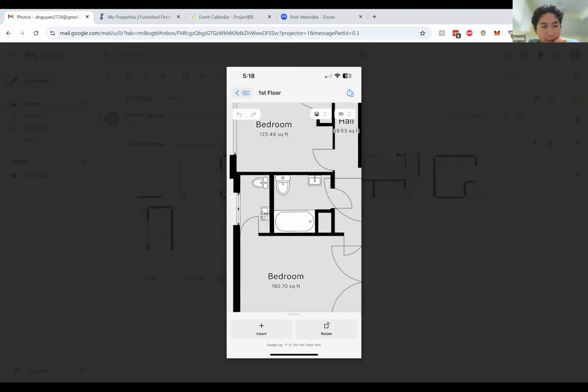One more question I had, since I'm able to close on permits with this with the seller, what forms do I need to fill out with the city to authorize me to do that? You can be their agent. So you could be the agent of the homeowner. So they can sign something saying that you're the agent allowed to submit for the permit. Is there an official form from the city of Seattle that I need to fill out, or is it just like... It's on the permit submittal. You'd write down your name, and then you can put agent, and then they would sign that same permit intake form.